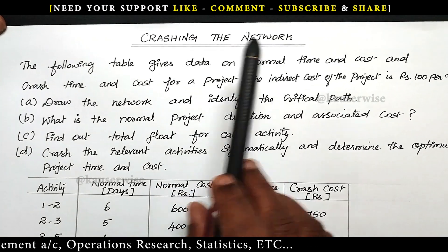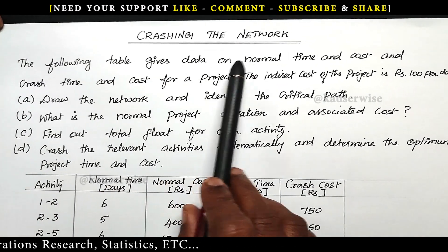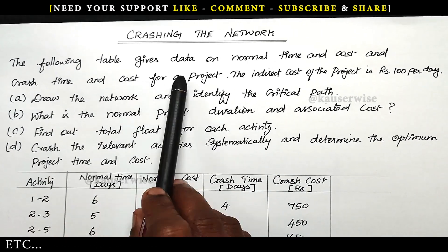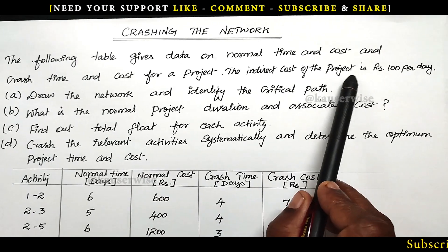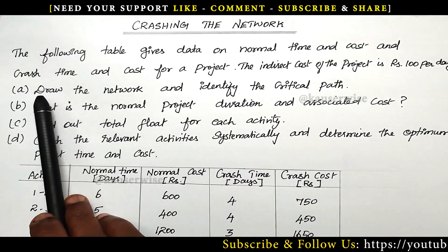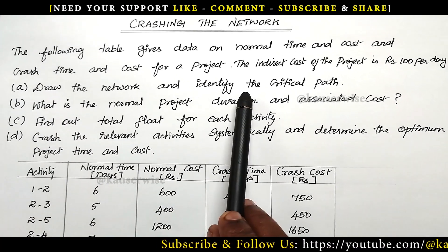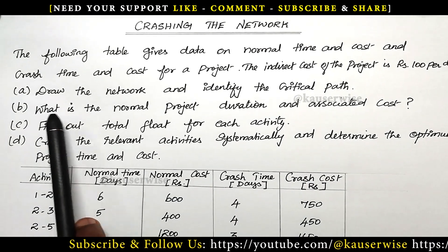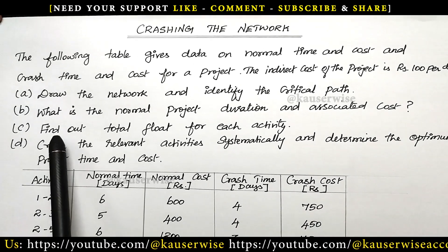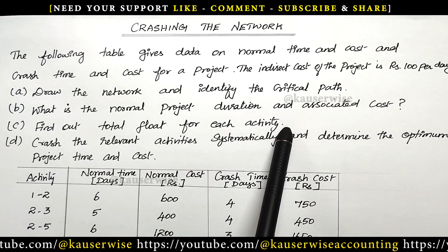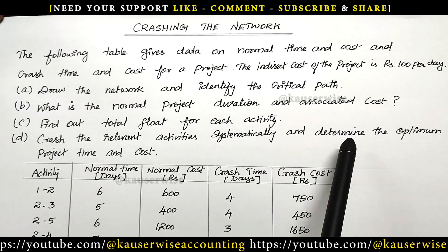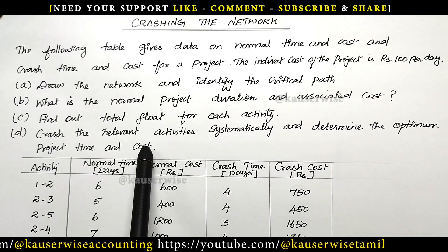See the problem: crashing the network. The following table gives data on normal time and cost and crash time and cost for a project. The indirect cost of the project is 100 rupees per day. With this information, they are asking us to: number 1, draw the network and identify the critical path; number 2, what is the normal project duration and associated cost; and number 3, find out total float for each activity.